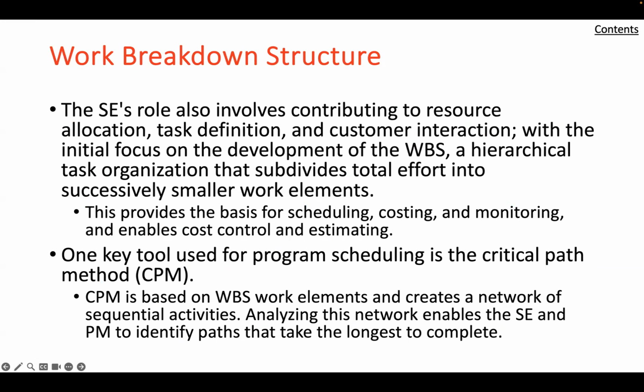It defines all of the tasks in terms of goods and services to be accomplished during the project in terms of a hierarchical structure. Its formulation begins early in the concept definition phase to serve as a point of reference for concept trade-off studies. It is then more fully articulated in the latter stages to serve as a basis for the system lifecycle costing.